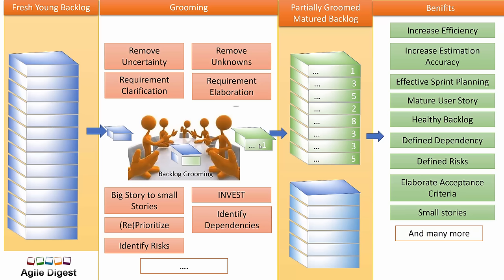We already define our dependencies during grooming. We know for each story what the dependencies are and who we need to talk to — that person, that team, or any other member — to clarify them. We also identify risk in the grooming session, which makes it much easier to mitigate those risks earlier. Based on that, you can do sprint planning knowing the risks and deciding whether to resolve them or move the story to the next sprint.